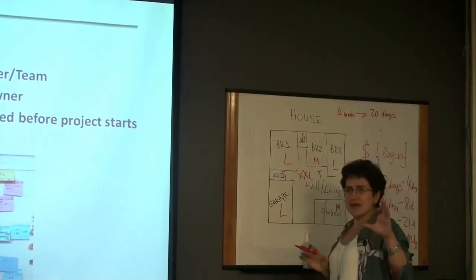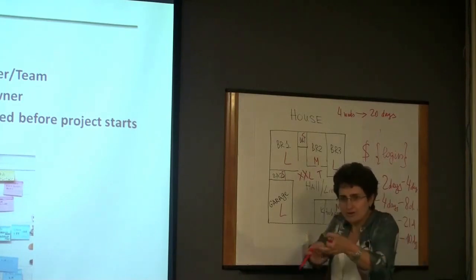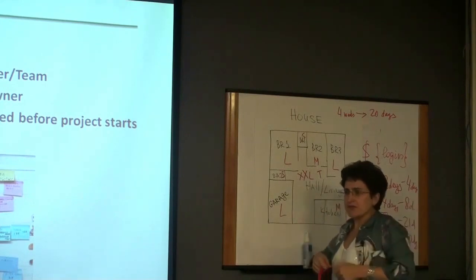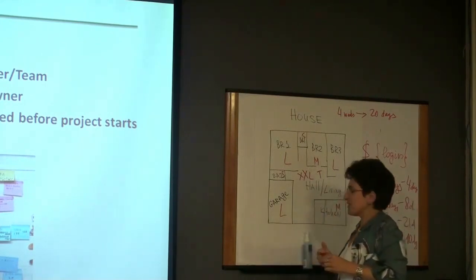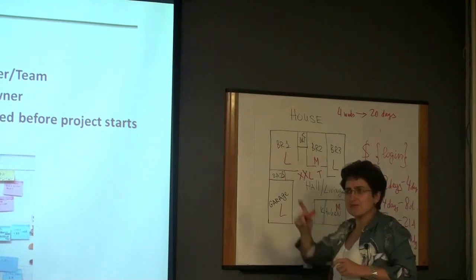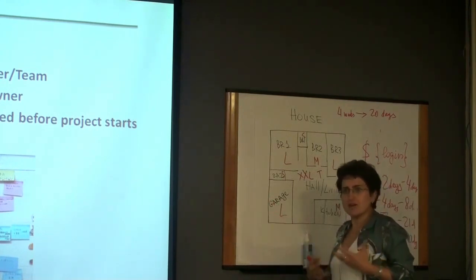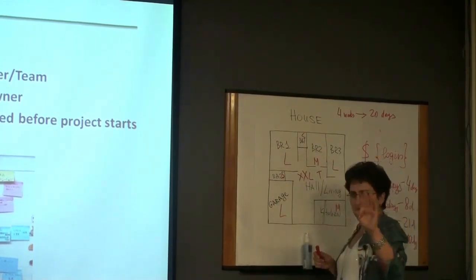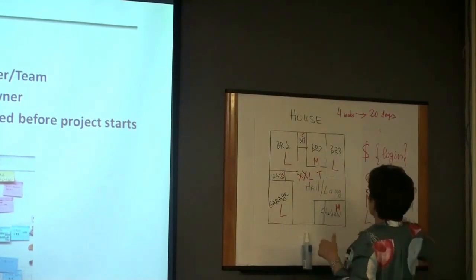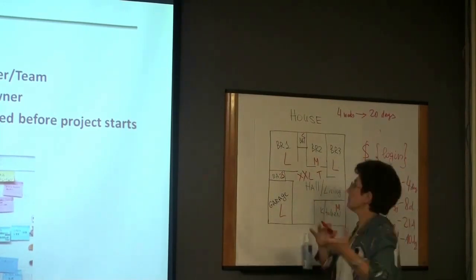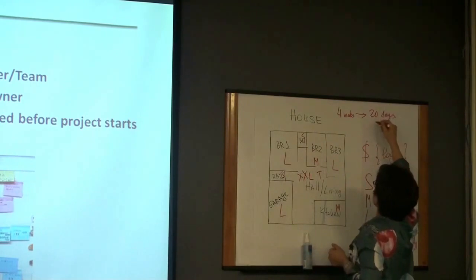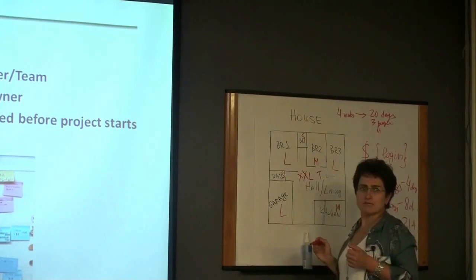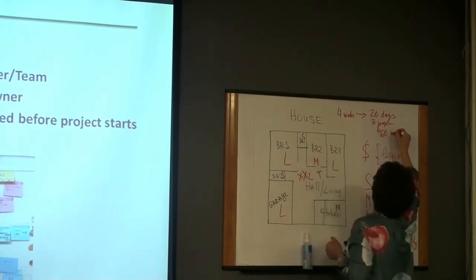And let's say we have a development team, the guys who actually do the work, not the Scrum Master who runs around, right, with the stick and makes people do things, and not the product owner who chats with customers all the time, but the actual hardworking guys, right, in working helmets. We have, let's say, 2 developers, 1 QA. This effort is collective between QA and development. So we know that if we have 20 days and 3 people, how many man days do we have? 60, right? 60 man days.